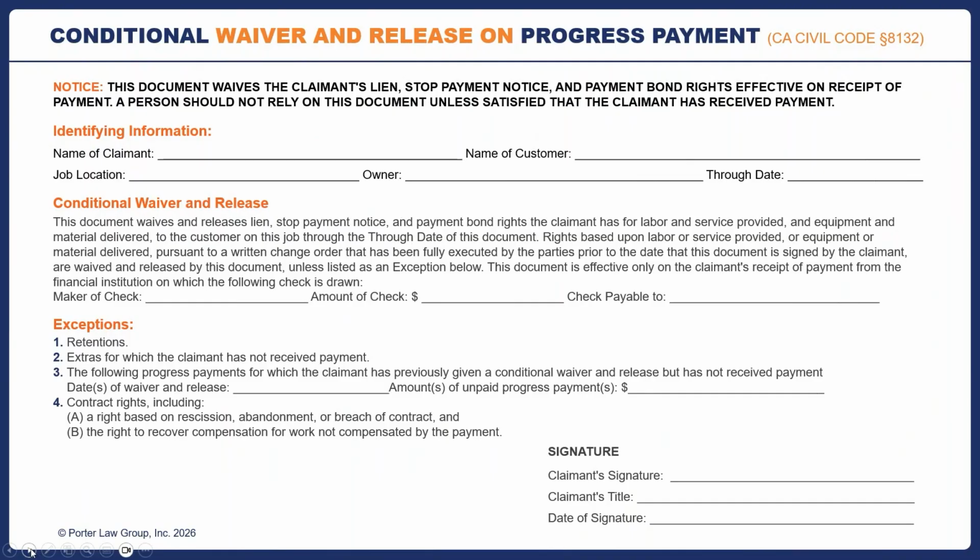Sometimes people want you to sign these before a notary, and if you want to push back on that, that's fine, because the statute does not require it. And you can say, hey, if you look at the statute, it says you're not supposed to change anything. Well, I kind of view requiring you to notarize it as a change in what is allowed under the law. So you could push back on that. But on the other hand, you should probably have someone in your office who is licensed to be a notary. It's a pretty easy thing to do. And we have 2 people here that are notaries, and so it's just handy to have. It might be something you think about.